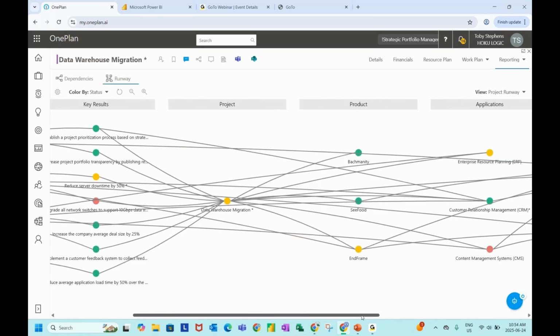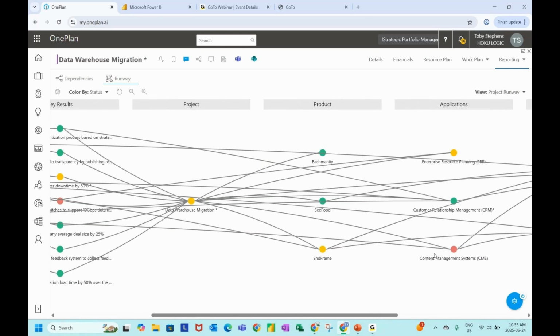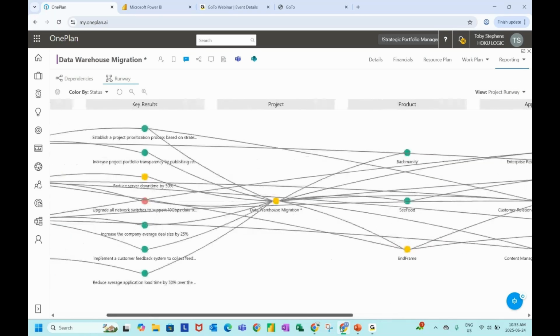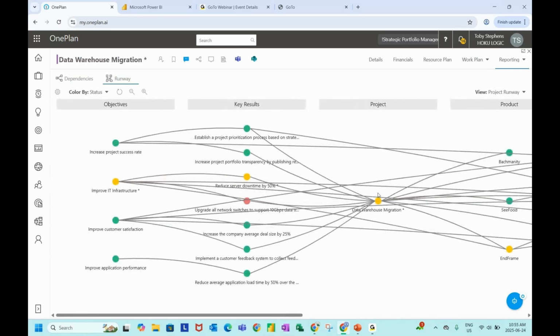What does it touch, for example? So let's say you have one of the applications, maybe a CRM application, and you have to decommission that CRM app, and now you have been told that next year this application is going to be decommissioned. We need to see what the impacts are, what the risks are. So you can always come into this visualizer and look at it and say, well, this CRM application is dependent on this plan. So until this project is done, we cannot decommission. So this will give you that kind of visual on what is happening with this particular plan.